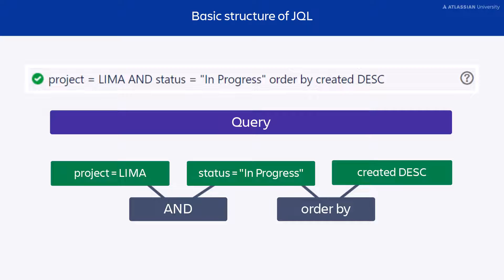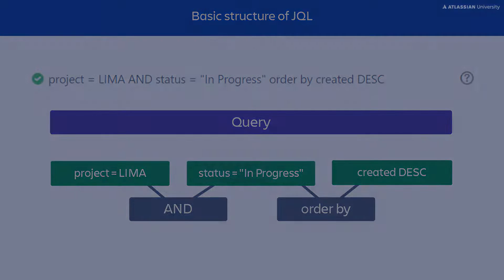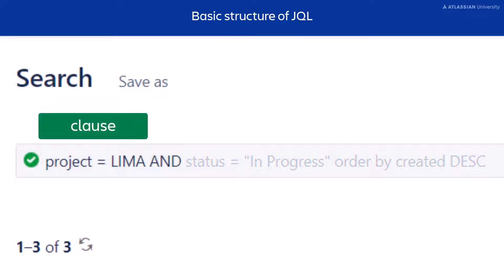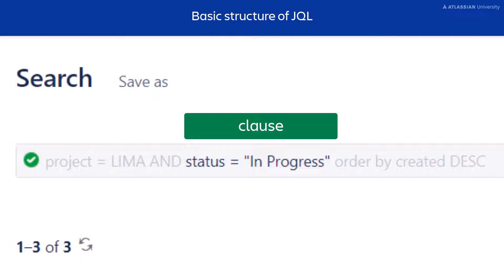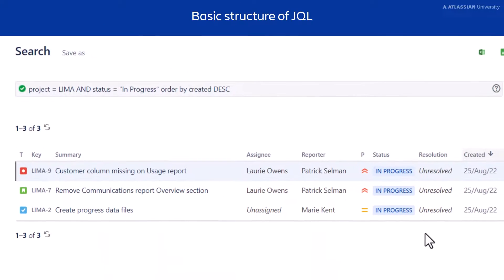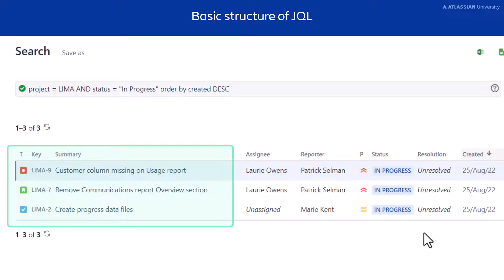Let's go back to our query from earlier and apply this new knowledge. Here's the first clause: the field is Project, the operator is the equal sign, and the value is Lima. The keyword AND allows us to connect this clause with another. The next clause's field is Status, its operator is the equal sign, and the value is In Progress. This query tells Jira to show issues in the Lima project that have a status of In Progress, and to order these issues by their created date in descending order.